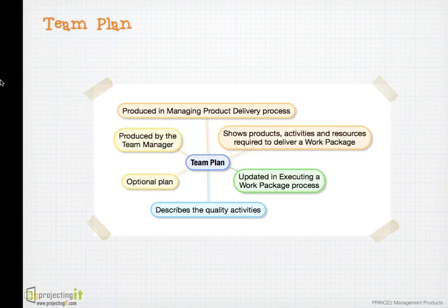Team plan is used by the team manager to describe how the work package will be delivered to the project manager. Team plan is produced in managing product delivery. It defines the task, dependencies, resources, efforts, and cost of the project.